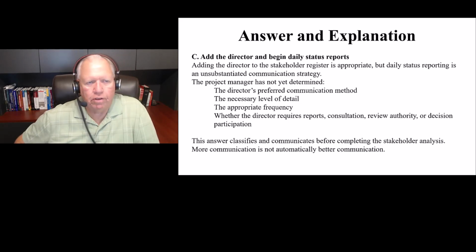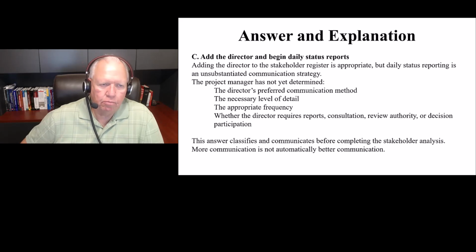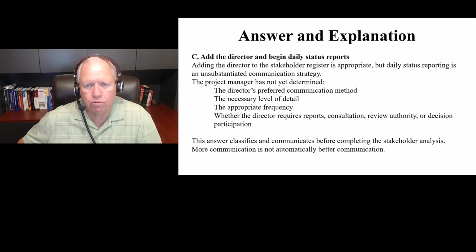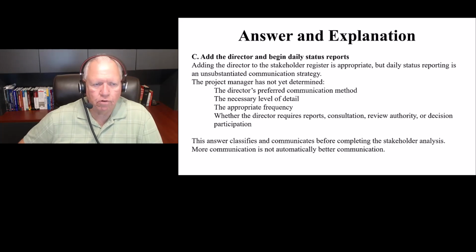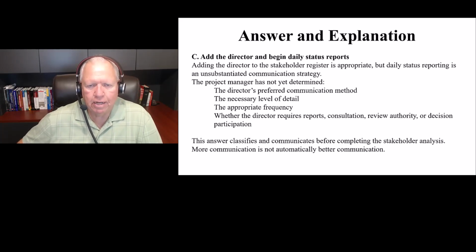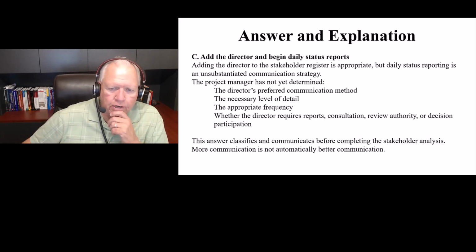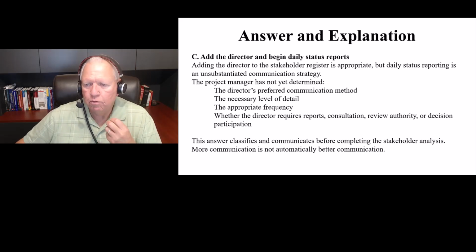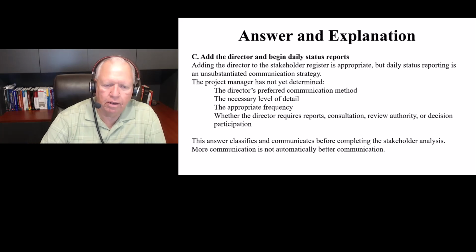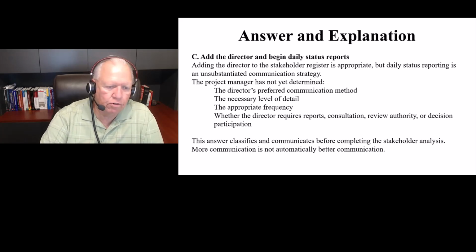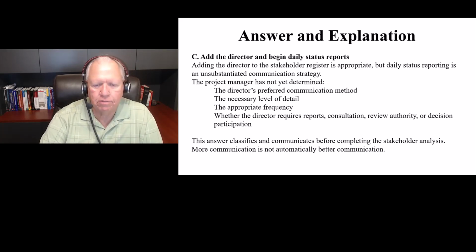The other thing, at C, add the director and begin daily status meetings. Adding the director to the stakeholder register is right, but daily status meetings is an unsubstantiated communication strategy. The project manager has not yet determined the director's preferred communication method, the necessary level of detail, the appropriate frequency, and whether the director requires reports, consultation, review authority, or decision. This answer classifies and communicates before completing the stakeholder analysis. More communication is not automatically better communication.